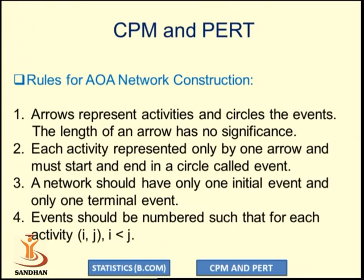Duplication of activity should not occur; it is uniquely identified and uniquely represented in a network diagram. A network should have only one initial event and only one terminal event, so each event is uniquely identified. To give the event number, we use the relationship that for activity IJ, the tail event I should be less than the head event J. We number from left to right and top to bottom.